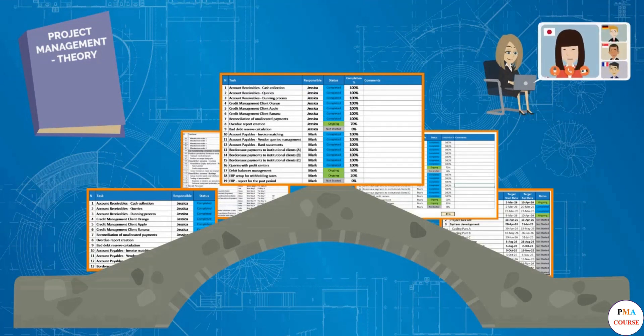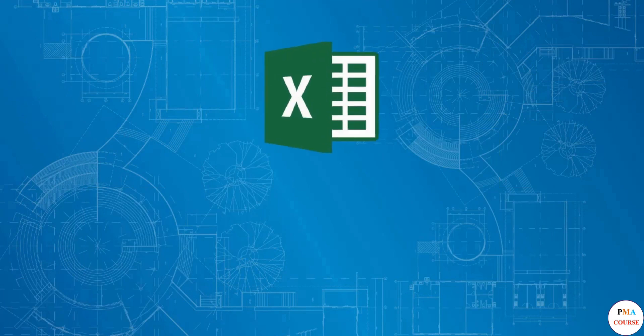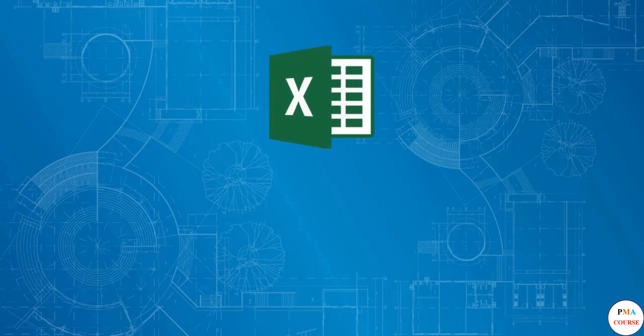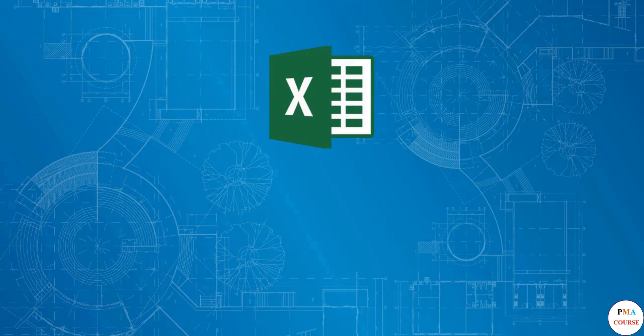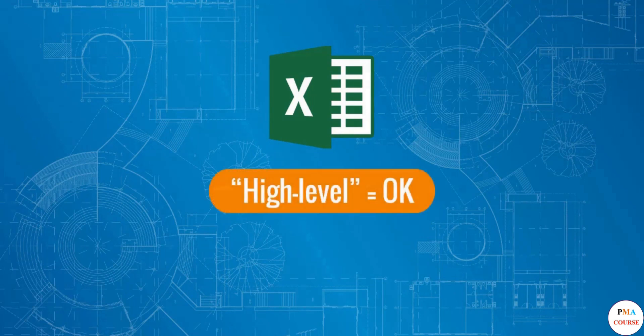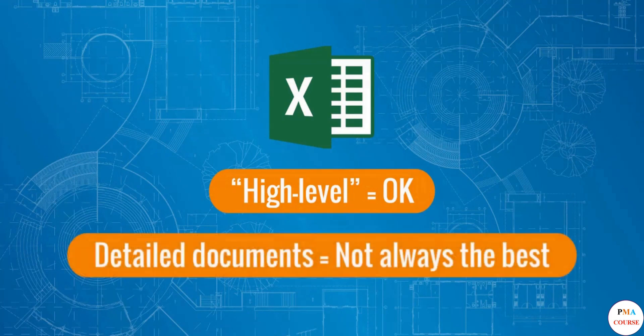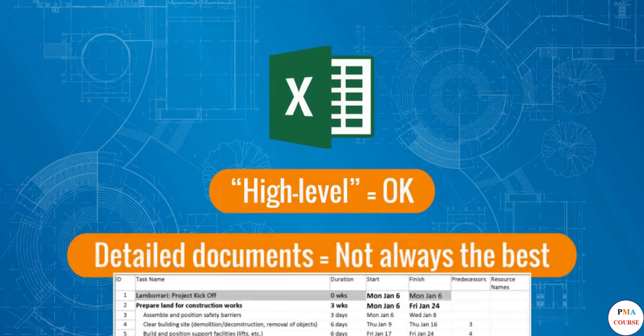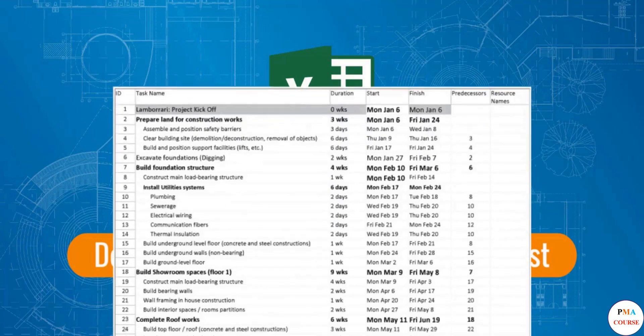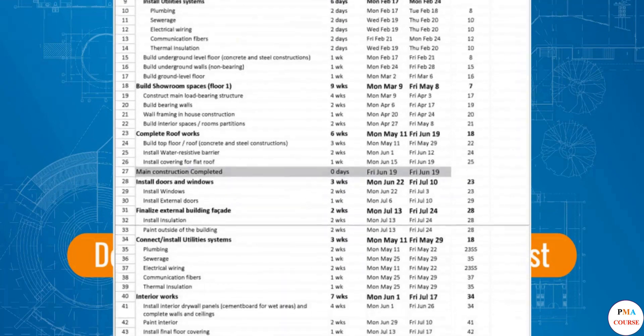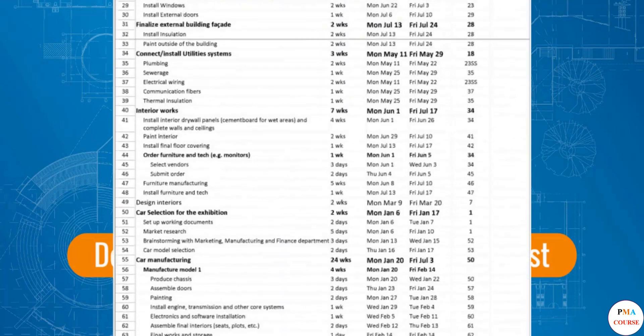In terms of software, Microsoft Excel also has certain limitations and may not always be sufficient. For example, the project schedule and Gantt chart may be created and maintained on a more high level in Excel. However, if you need to prepare a schedule with hundreds of rows, Microsoft Excel will not be the best option.